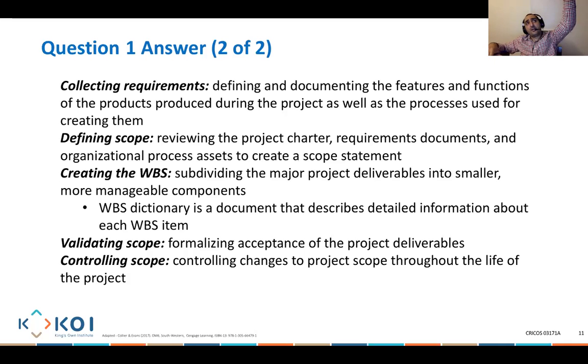If I want to get a house, what do I need? I need the garden, the barbecue area, the actual rooms and kitchen, the bedrooms and the toilets. There are all of these main things you need to do. So you start from the high level, then you create the main things you need to do. Then you go to the sub things. If I say I want to create a toilet, what is actually involved in creating a toilet?